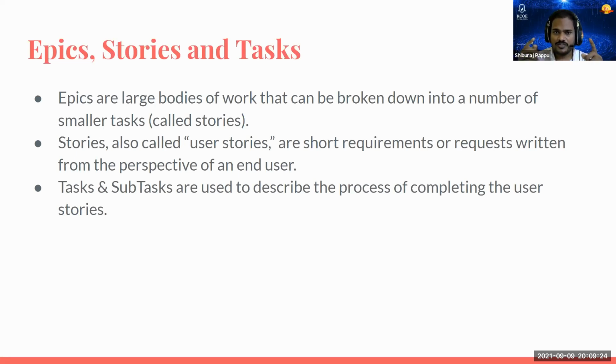If you remember, I told everyone to prepare your Gantt charts, right? This was the purpose, so that you can start working on epics and stories. Now let me tell you what epics and stories are. Whenever I take a big project, in Agile you first divide it into small modules. The modules must be independent. It should not be completely dependent on something else, but should be independent.